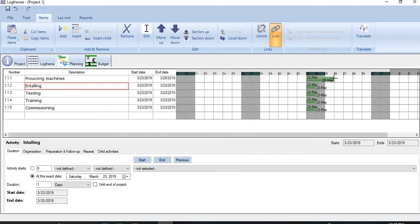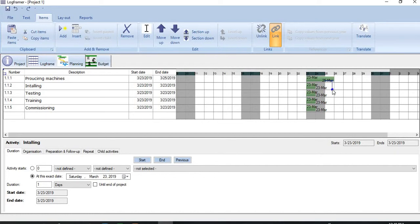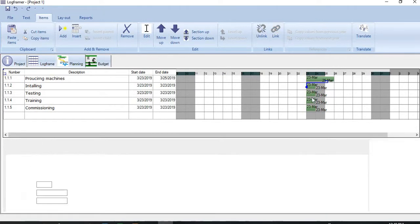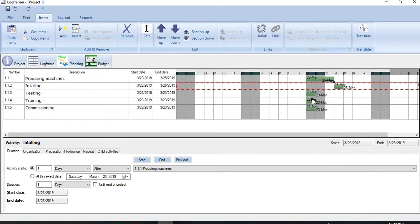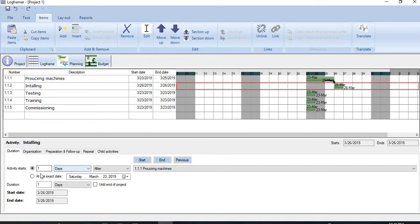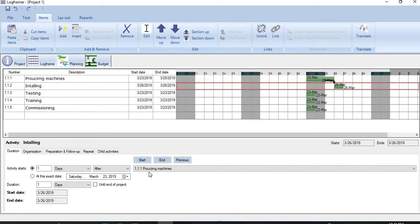The moment we bring it to the end, you see here a plus sign is appearing. Now push the left button of your mouse and drag it. You see a blue line with an arrow is appearing here. Let me bring it to the start of the second activity, Installation. So the moment I did it, the relationship has been established here. And details have changed here also. You see the activity starts one day after procuring machines. The same method we can apply on other activities also.